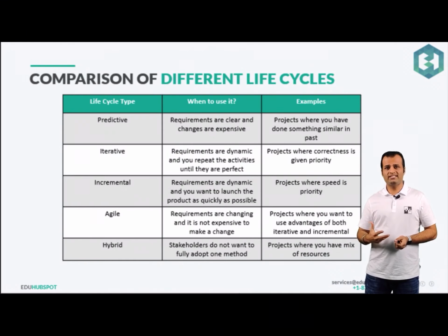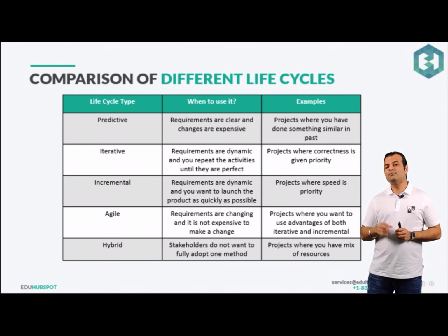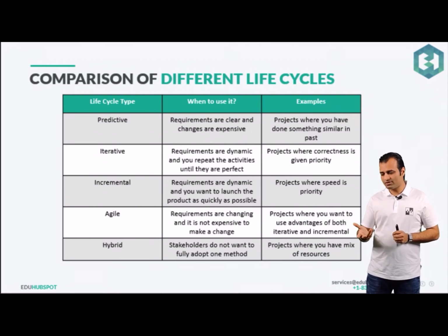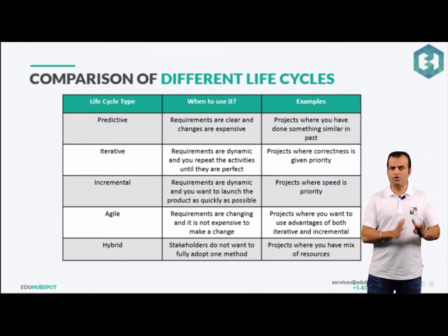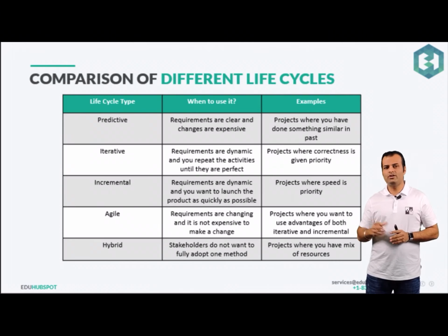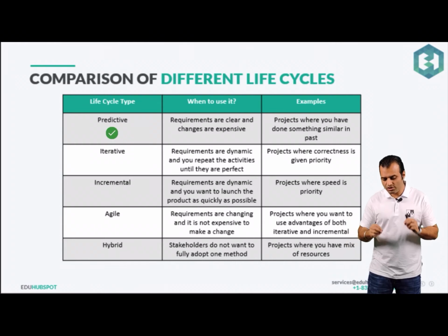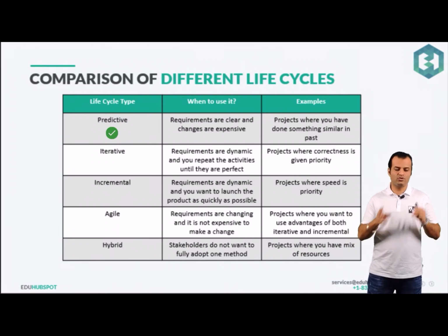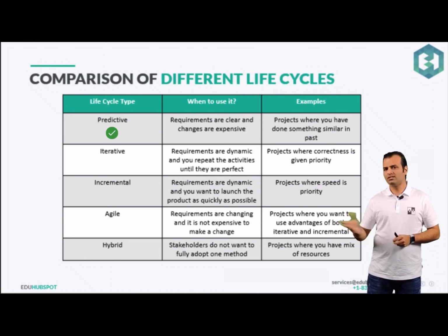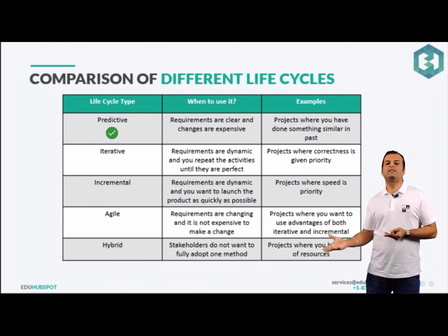Okay, let's quickly see the difference between the different life cycles, and this is a very important slide because you will get a lot of questions from it, and of course I have added many questions on this topic so that you can understand it properly. So first, the traditional waterfall, which is your predictive. When do you use it? When your requirements are clear, when you know that your changes would be very expensive, so you prefer the predictive analysis. Just like your example was, something which you have done in the past.